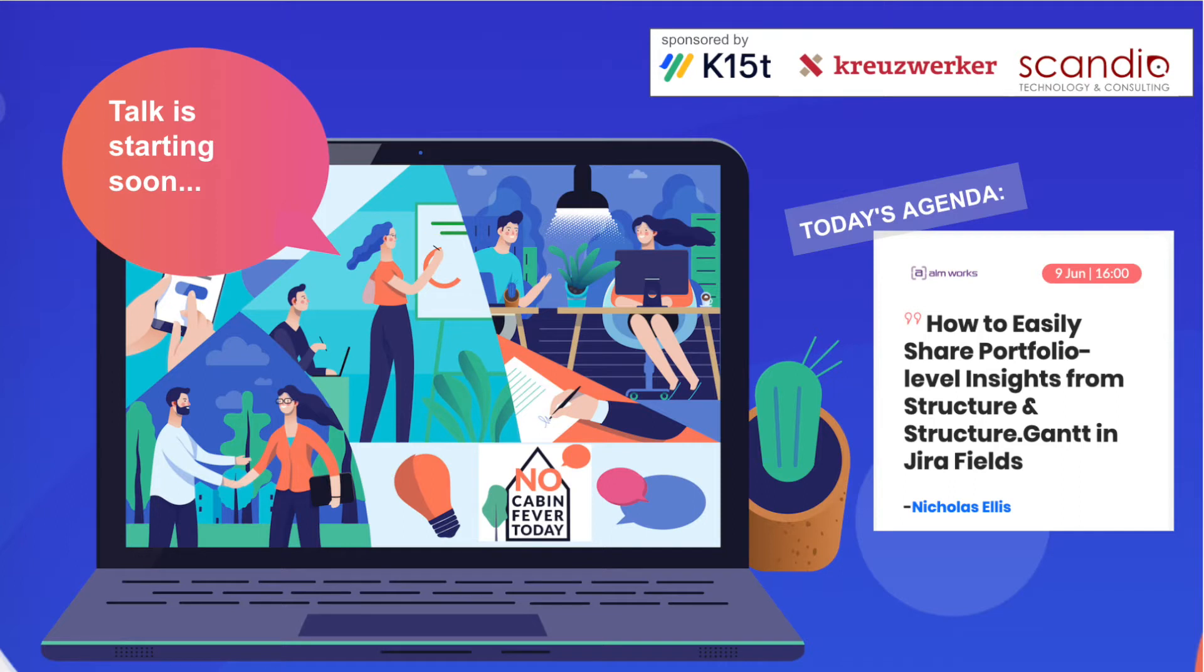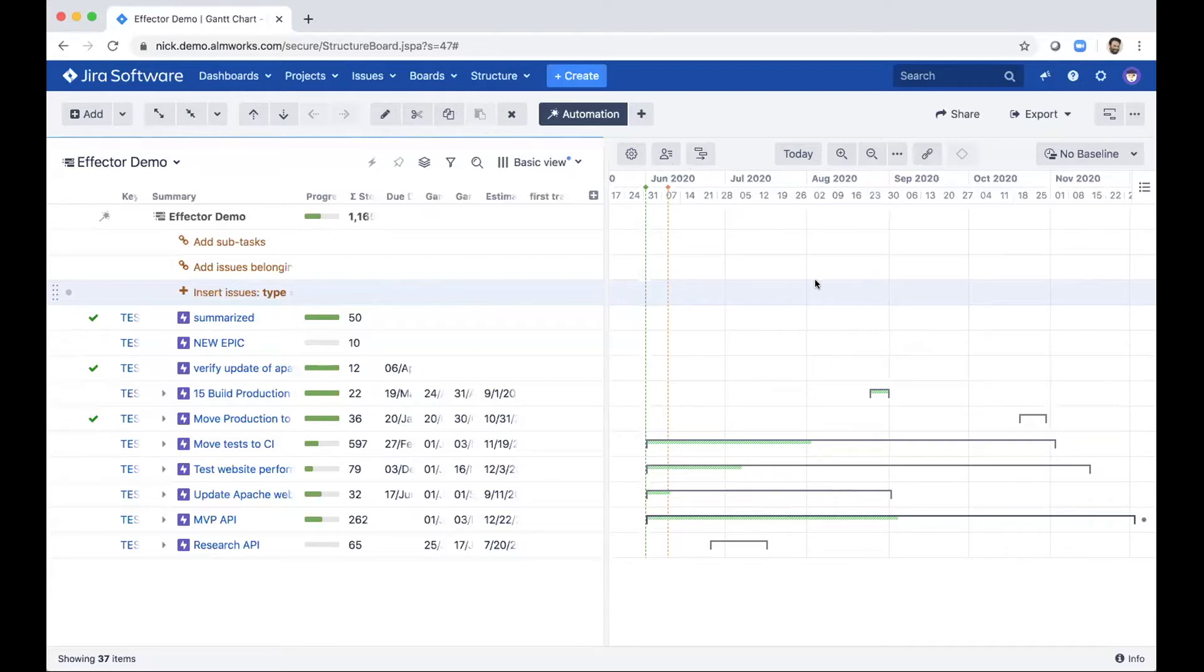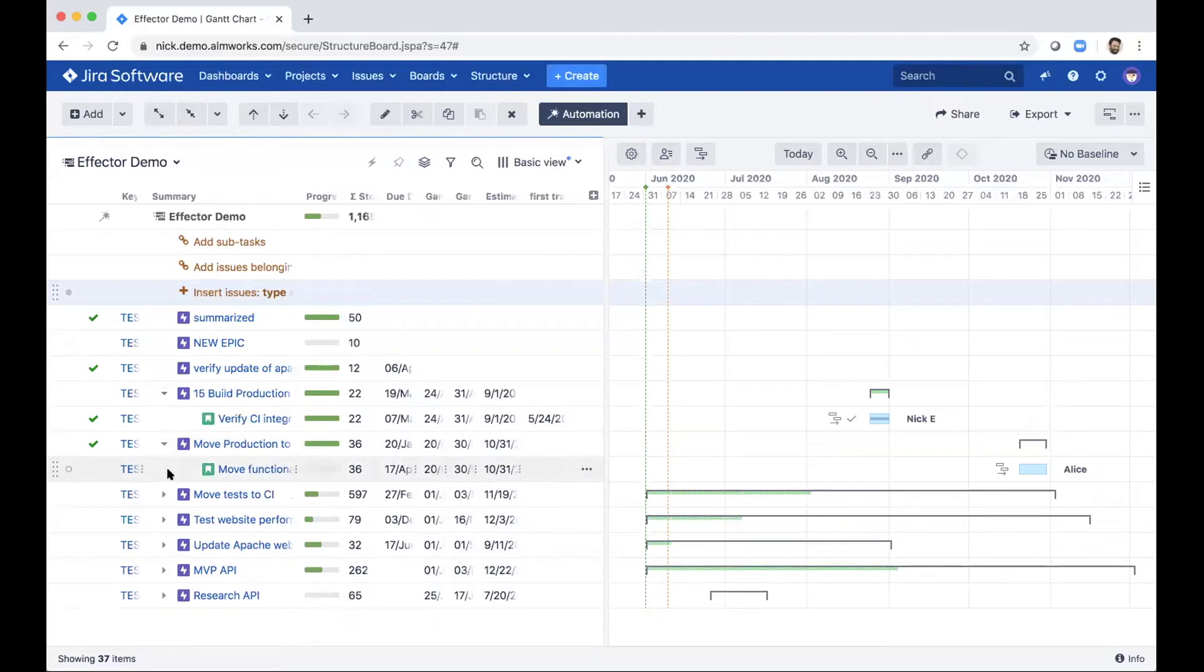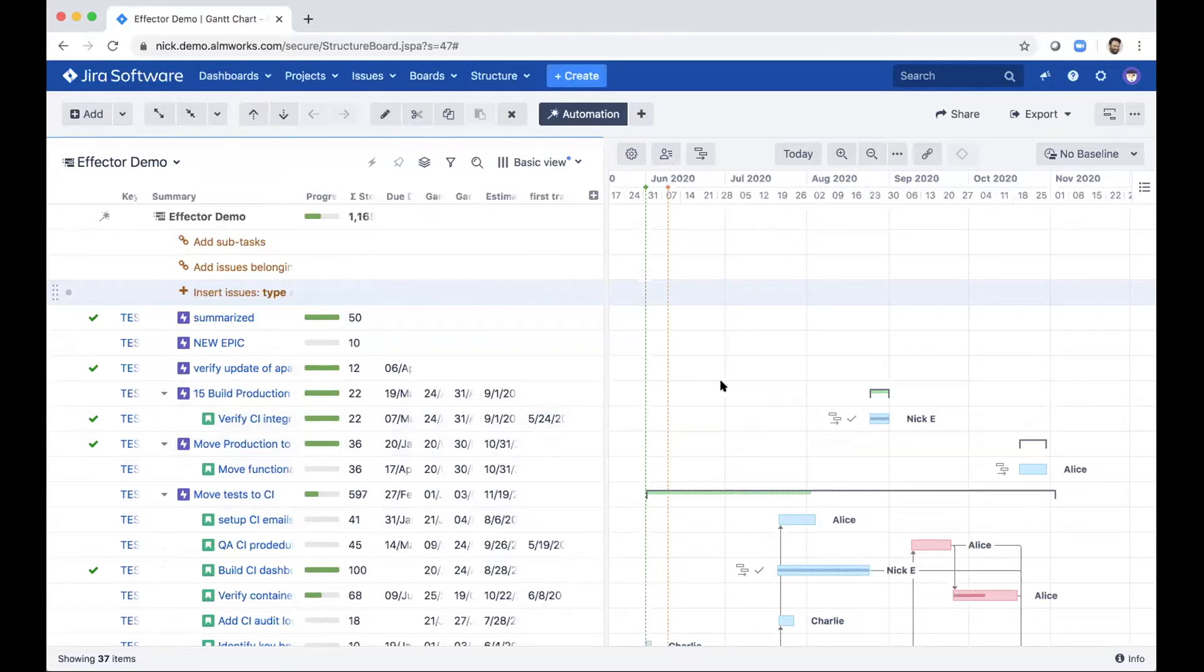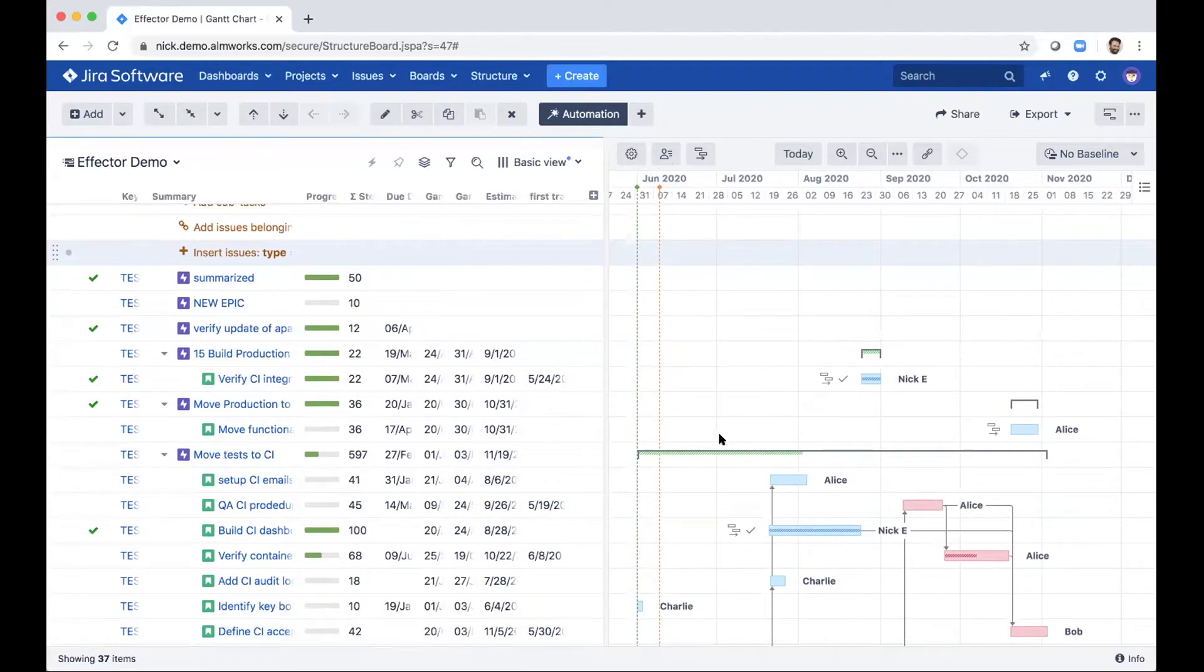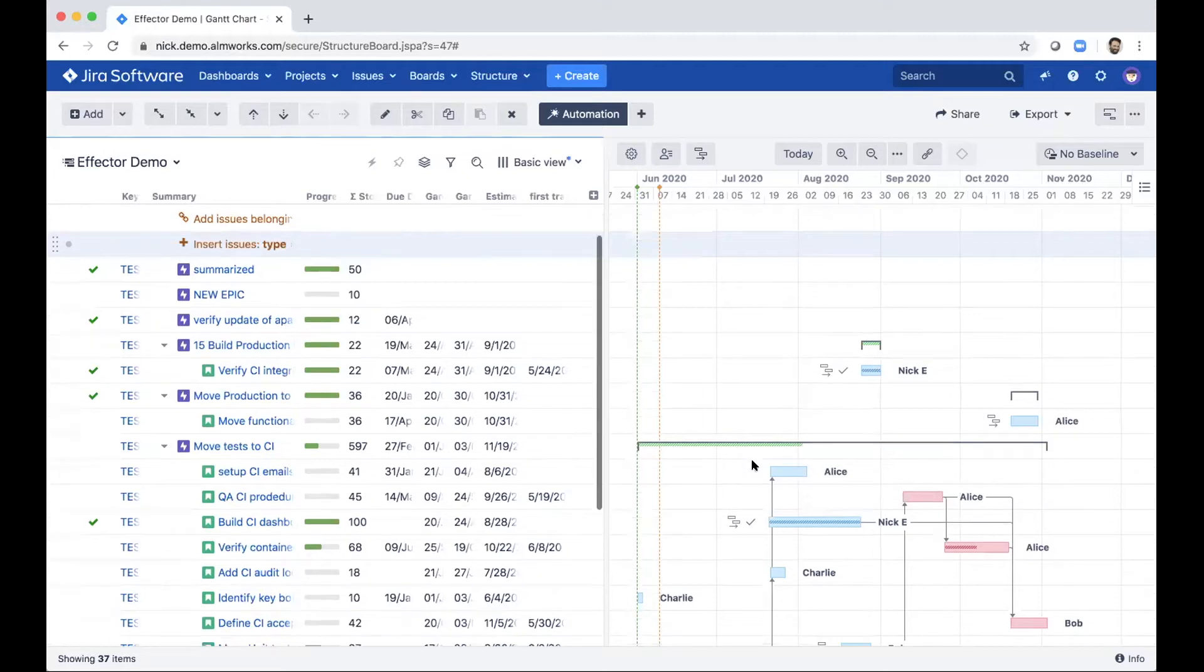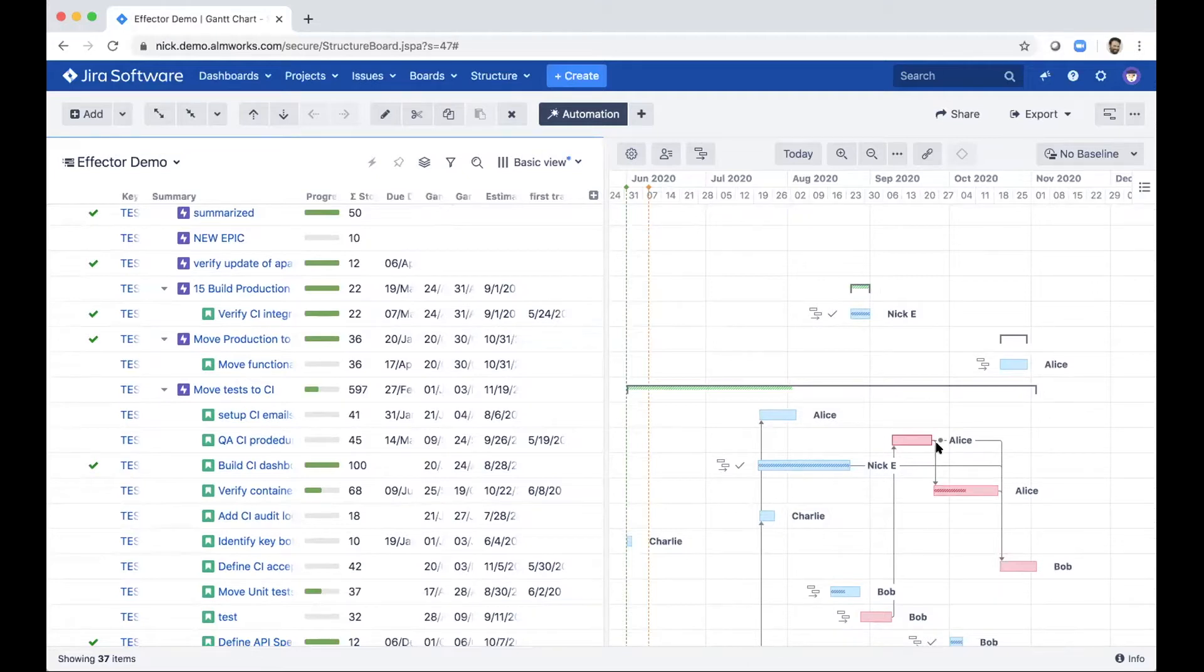Thank you so much. So hopefully you guys can see my screen here. So yeah, this is just structure on the left here and structure.Gantt on the right. I've started with just a really simple hierarchy. So we've got epics on top and then some stories underneath and some subtasks below them. But we're really just going to be dealing with the epic and the story level here. So as we look on the left, we can see that the epics are being treated as groups. They're these large brackets here, so they're basically a grouping of all the work underneath them. And then underneath we can see this plan that we have. We have all the different work, who it's assigned to, some relationships between that work.